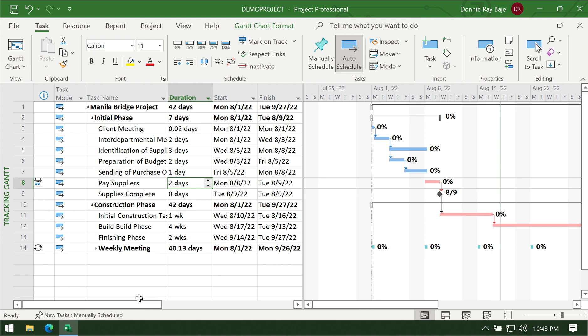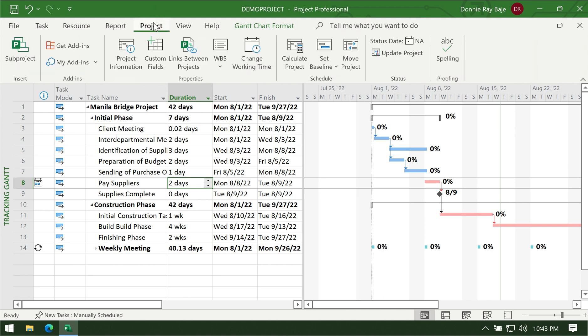The first thing you have to do whenever you're going to use MS Project to track your project is you have to set your current state as a baseline. The baseline pertains to what your original plan was, because during the execution of the project it's possible that there are changes.